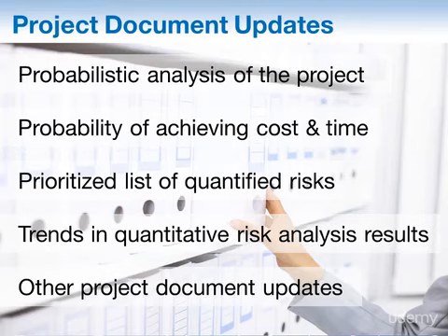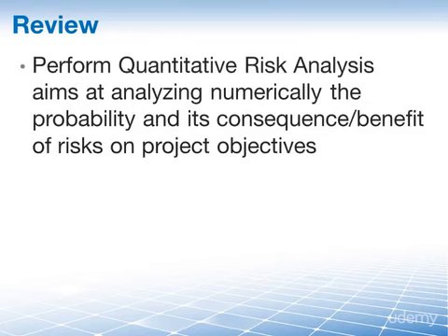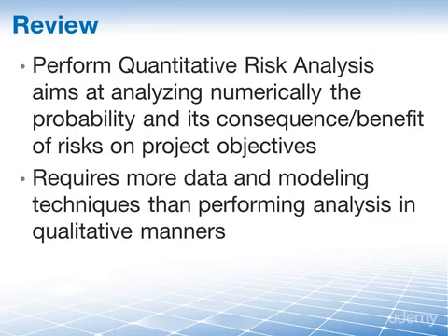cost communications. Let's review. Perform quantitative risk analysis aims at analyzing numerically the probability of each risk and its consequence on project objectives, while the qualitative risk analysis just gave you a high, medium, low ranking. This process here will give you a numerical ranking. However, it requires more data and modeling techniques than performing the analysis in a qualitative manner.